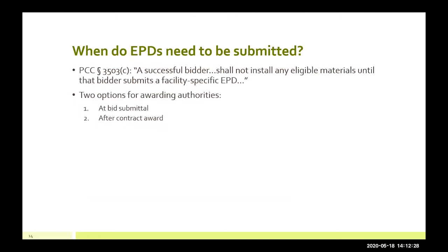And so at that point, it might make more sense for the EPD to be submitted in between that phase, so after contract is awarded to them and then right before installation, because that's the window you have before the material has to be installed. And so it's up to the awarding authorities to determine which scenario works best for the project in hand, and this might be a case-by-case decision. Next slide.